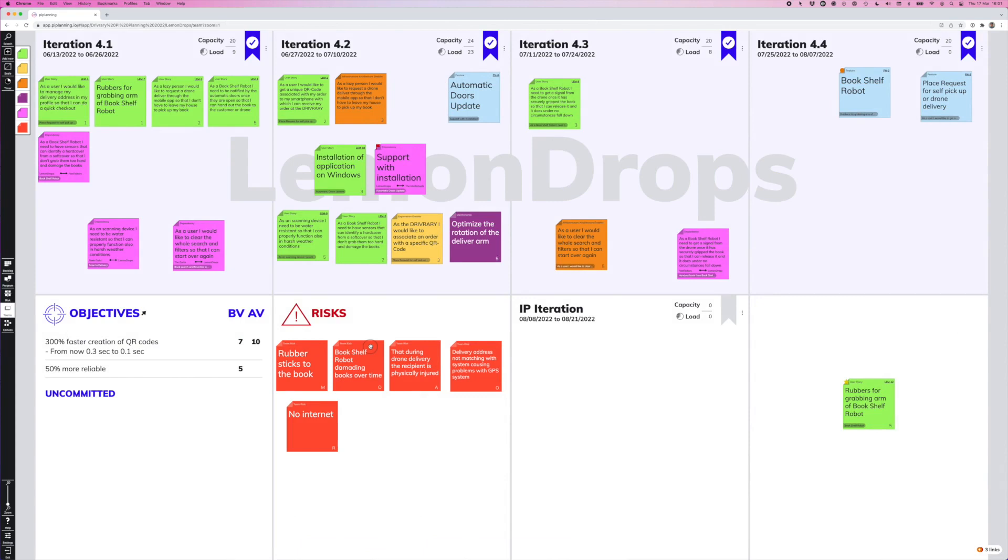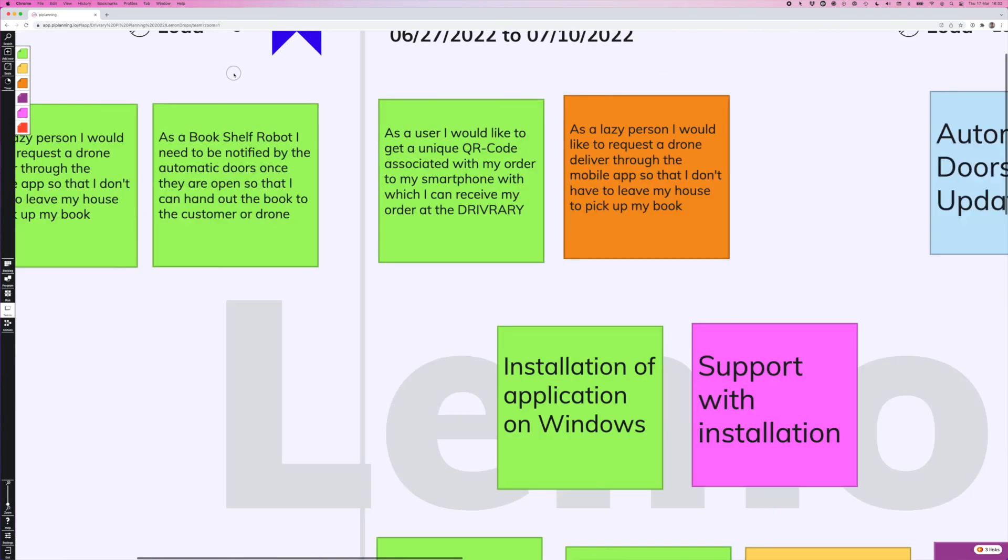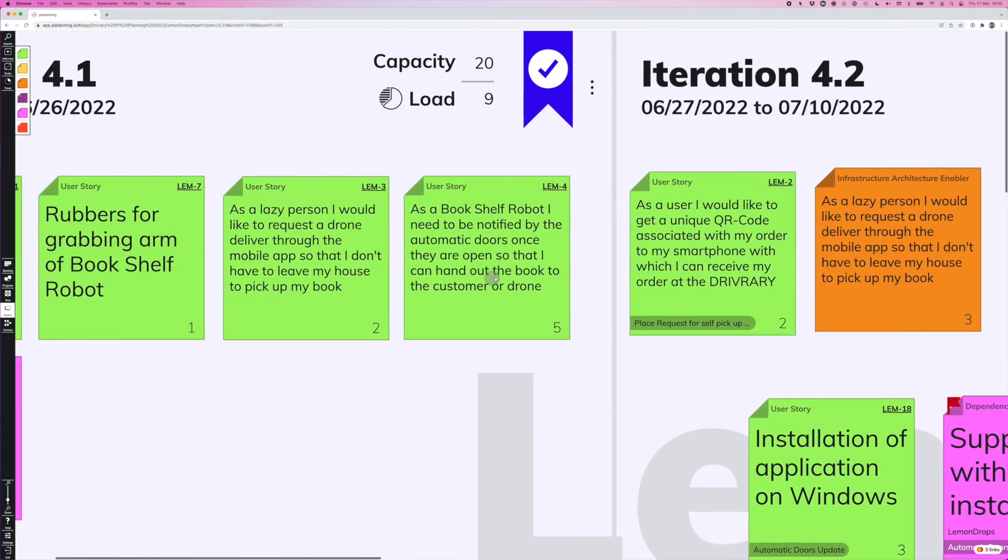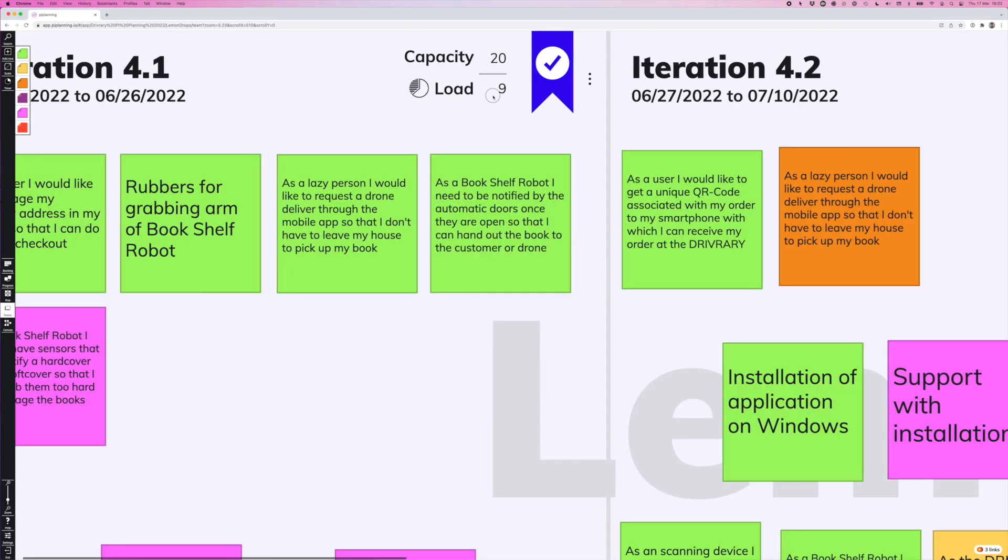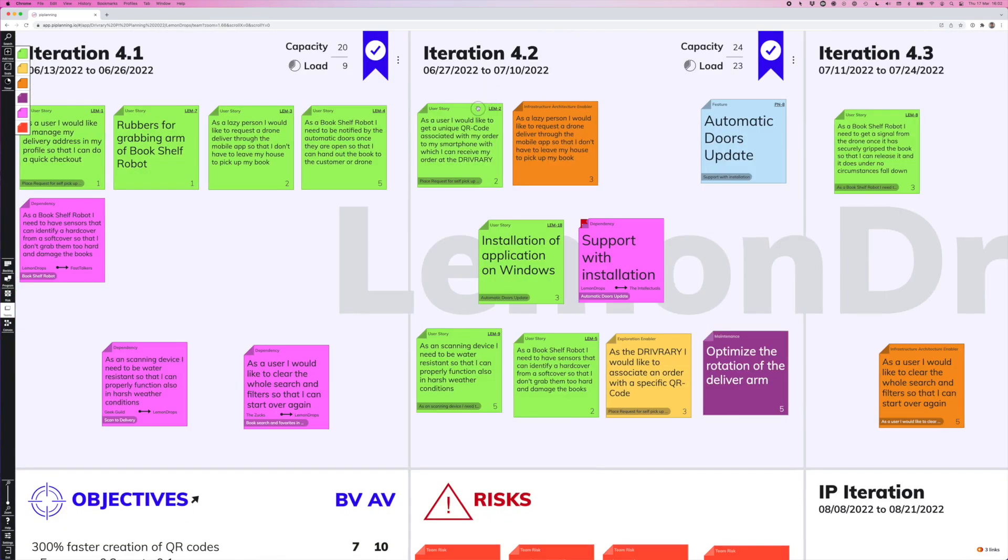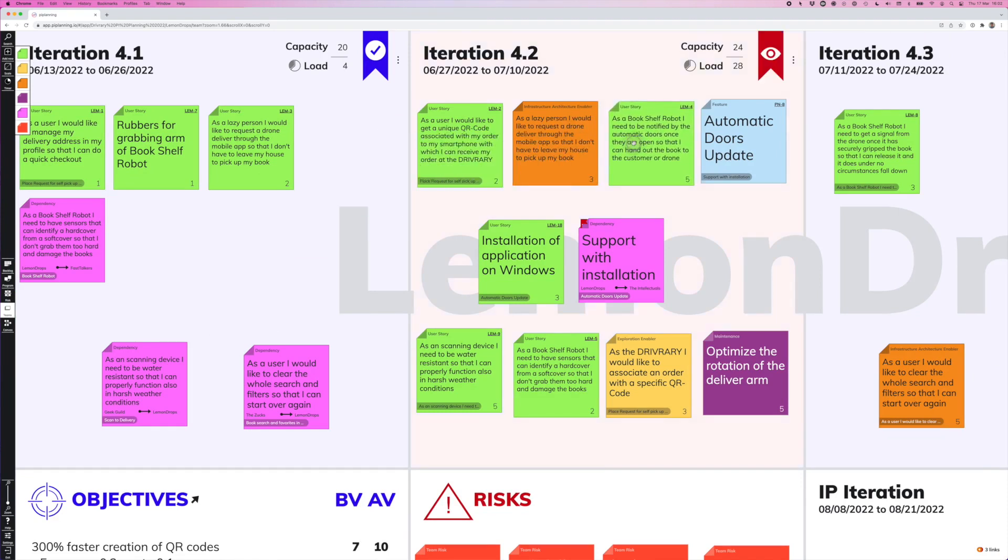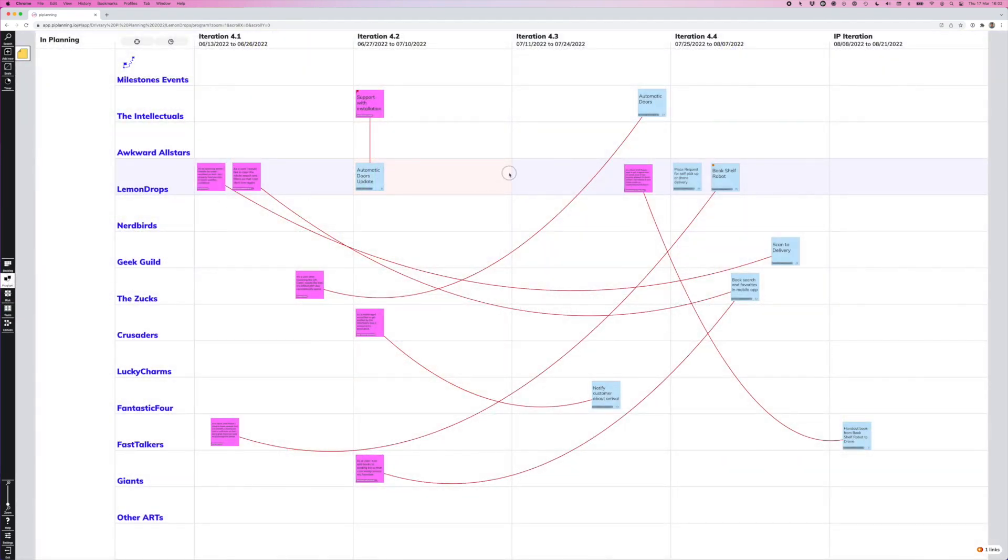Now for each iteration that we are planning, we can set a capacity up here. You can manually enter the capacity and the load is calculated automatically based on the story points that we have in this iteration here. So let's say we move this user story over to iteration two. Then we can instantly see that we have an overload now. And this overload is also reflected on the program board. So here we have this red spot and it shows the RTE, which teams have overloads in certain iterations that we might need to address because they may risk our plan.